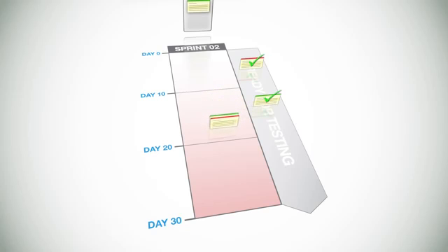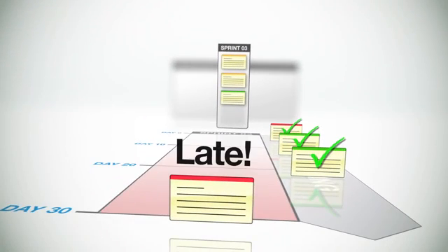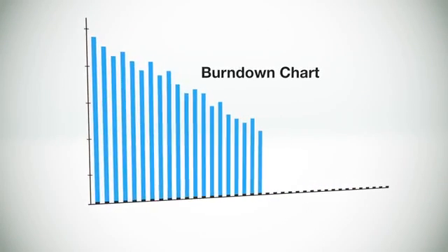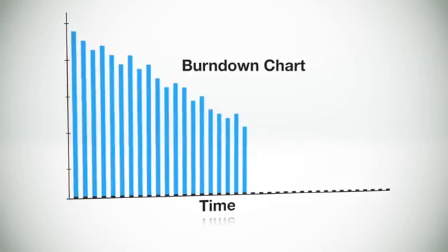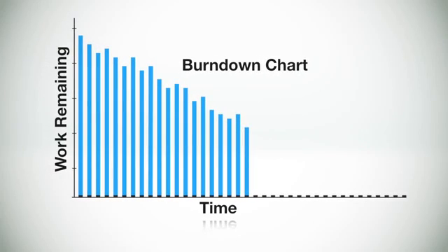Since sprints are a very short but a realistic representation of part of the product, a late finish of the sprint is a great indicator that the project is not on schedule and something needs to be done. Therefore, it's extremely important to monitor the progress of each sprint with this, a burn-down chart. The burn-down chart is the #1 reason for Scrum's popularity and one of the best project visibility tools to ensure a project is progressing smoothly.